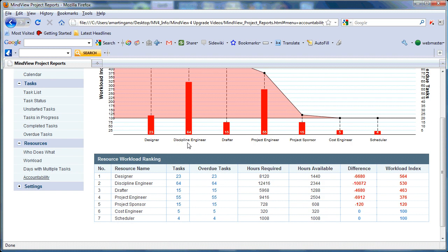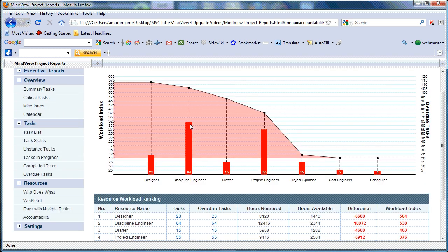For instance, our discipline engineer has 64 overdue tasks. If we look at that individual's hours required, there's over 12,000 hours required, but they only have 2,300 available hours. So in order to meet our required deadlines, we will have to offload some of that discipline engineer's work onto our cost engineer, our scheduler, or bring in a third party to further enhance our project capabilities in order to meet our deadlines.